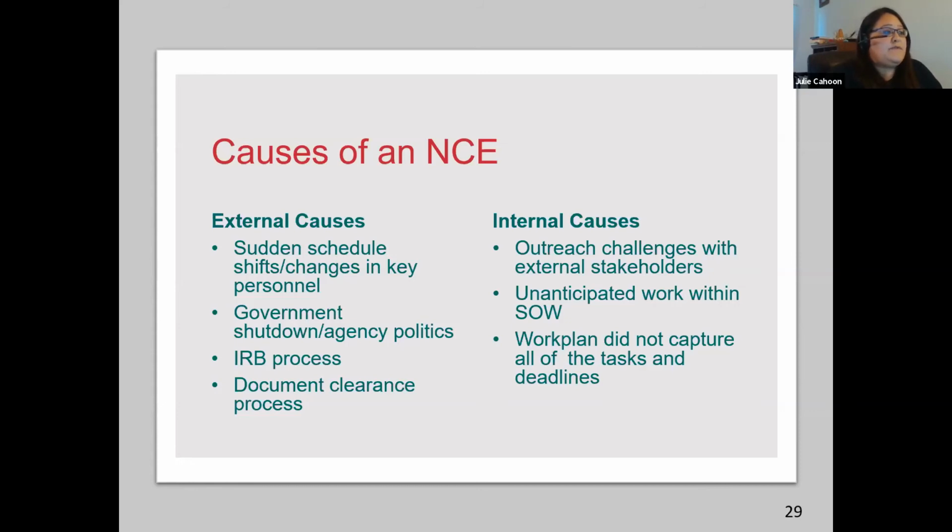And then another one is that review of final reports can take months to clear federal review. Depending on the type of grant you have and who your funder might be, the final review of certain deliverables can take longer if you're working with a federal agency. Oftentimes you're going to have to manage the review process of multiple offices within a single agency. This process itself can often range from 1 to 4 months, just depending on the particular funder that you're managing.